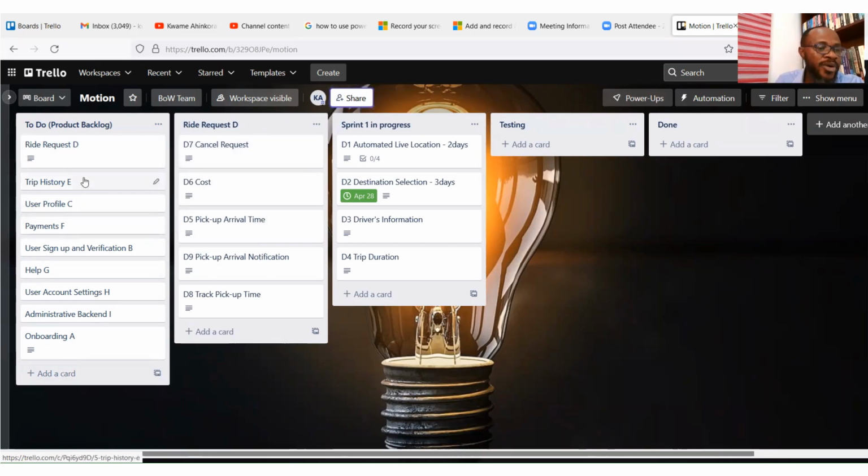And then even for the product backlog too, we can decide to reprioritize them according to which priorities have changed. If there are any irrelevant epics or user stories there, we take them off. And then we can also update them. We can also include new user stories or include new sprints that we have discovered.